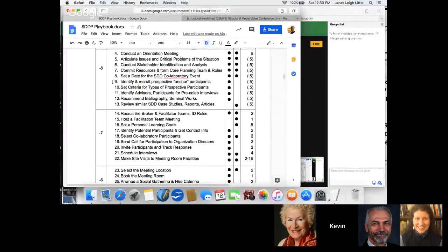I find having a dialogue with more than 36 people face to face takes a lot of resources. It's a couple hundred thousand dollar event. So you're usually looking for 12 to 36 people, given what most organizations' budgets are. And if you've kind of outlined criteria and parameters of aspects of stakeholders you're looking for, then you can combine them.